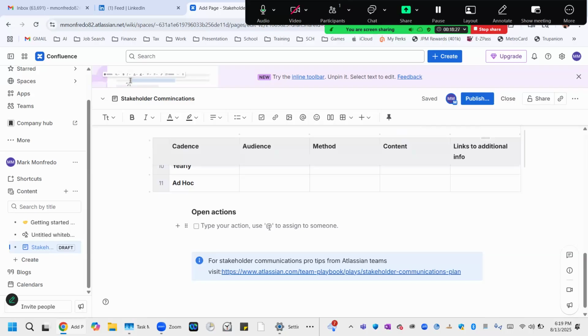And then having this bi-directionally integrated into your overall Jira plan, so that as you update this here, in the example I use, Mark's responsible for facilitating and sending the materials for the quarterly business planning, that would then automatically get updated inside of Jira when I import it.